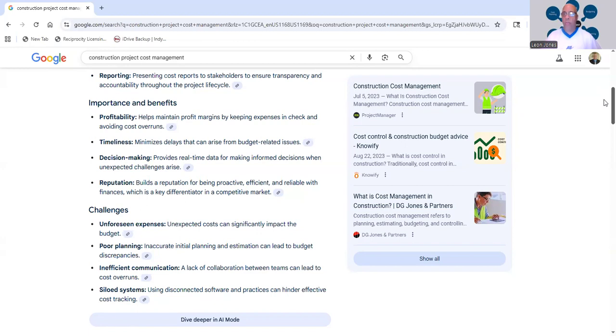So it's going to be a cost to take that tank and try to minimize the contamination from that old tank from the gases, because you could have had a gas station on that site. And even though the gas station has been abandoned for years, there is still some fuel in those tanks that can contaminate the soil.